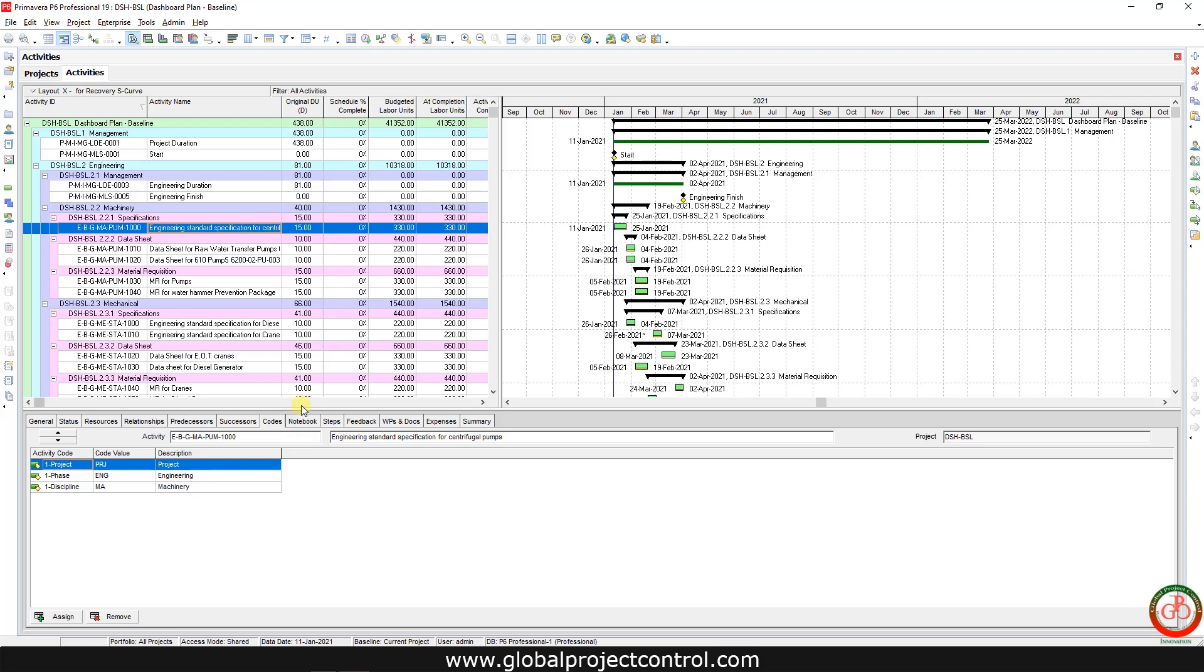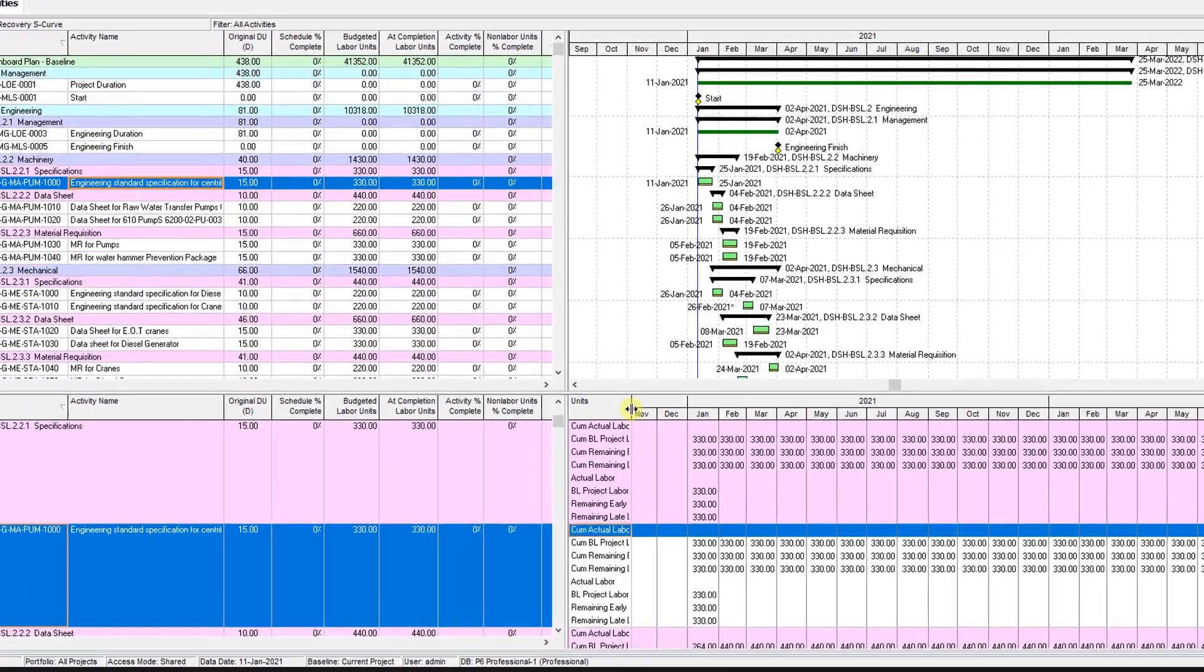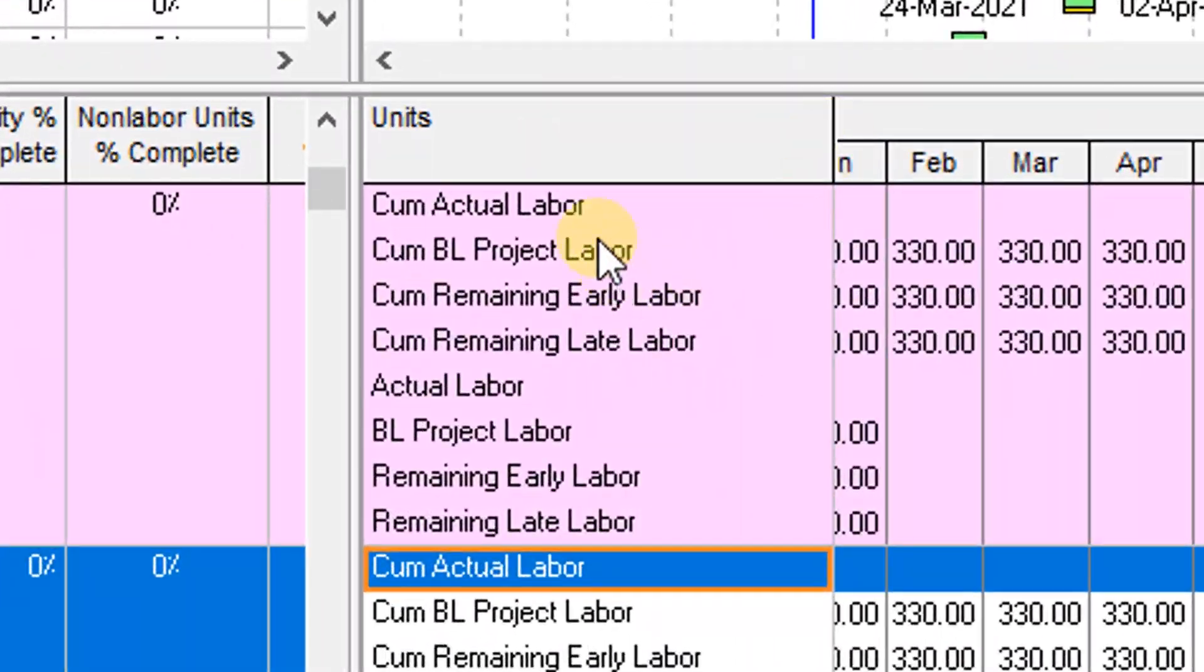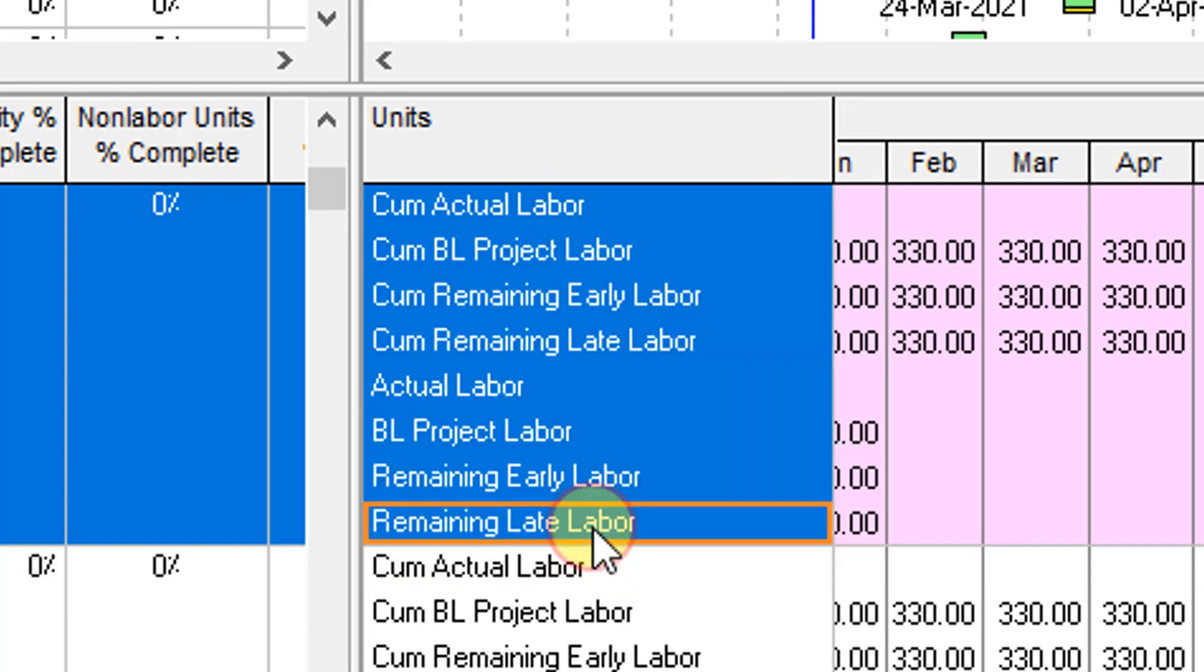Right now, how you can collect the information from P6. You need to go to the activity usage spreadsheet. Then these are the minimum requirements which you need to collect from P6: cumulative actual labor unit, cumulative baseline project labor unit, cumulative remaining early labor unit, and monthly data.